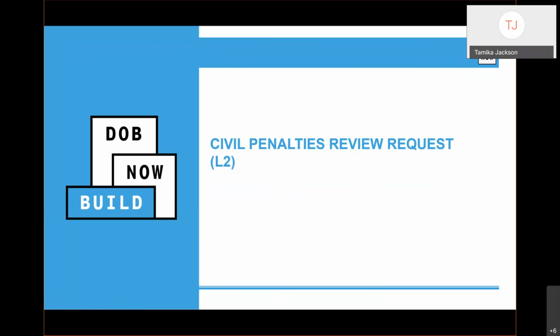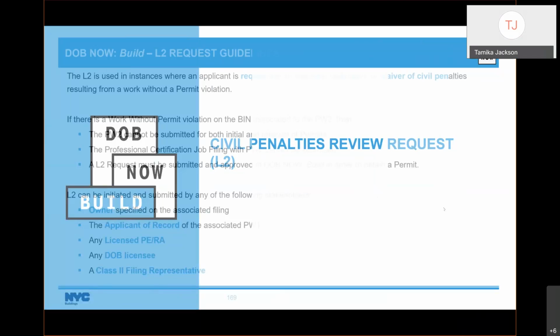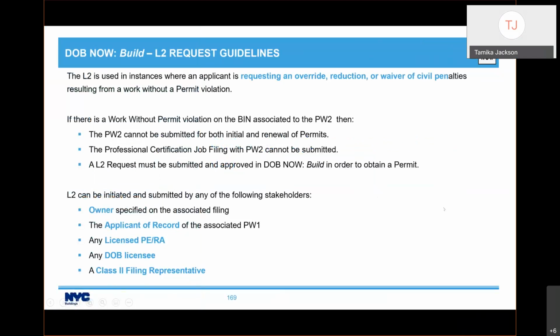All right, so while I wait for the results to come in, I'm going to just introduce L2s. So L2s address work without a permit violation. PW2s or work permits cannot be submitted, and you will need to submit an L2 in order to obtain a permit.